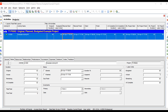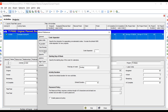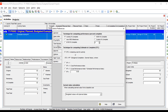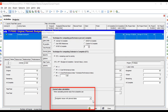I've deprogressed the activity again to set everything back. Now I'll show you something that adds another layer of confusion. I'm going to go to Admin > Admin Preferences and navigate to the Earned Value tab. You need to have a clear understanding of the bottom option here for earned value calculation. When we create a baseline in P6, we can tell P6 which fields in the baseline to use to calculate variance — that is controlled by this dropdown, which has three options: at completion values with current dates, budgeted values with current dates, and budgeted values with planned dates. By default it is set to budgeted values with planned dates.